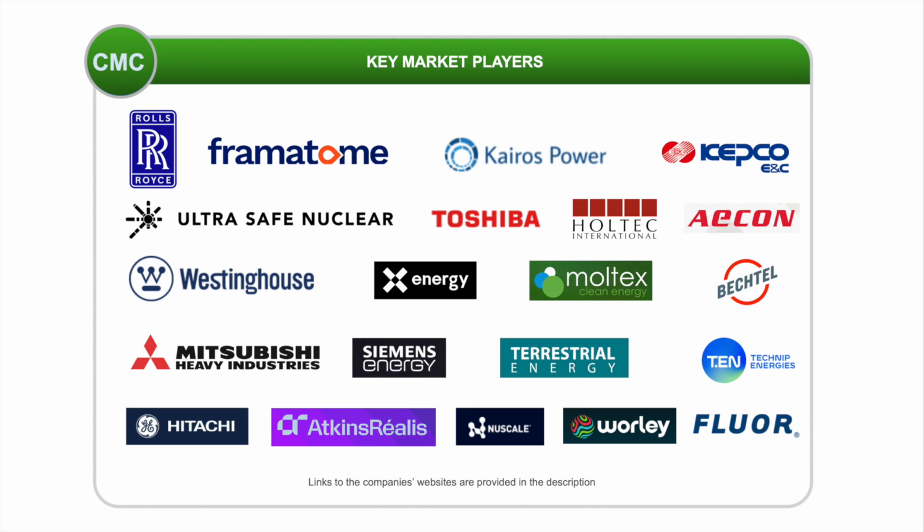To establish a preferred contracting strategy which will be acceptable to the key market players, you will need to conduct market consultation sessions with interested parties. You need to test your preferred strategy with key OEM suppliers, FEED contractors, and EPC or EPCM contractors to see if they are willing to bid, but also obtain their views and ideas of how your project can be implemented in the best way possible.